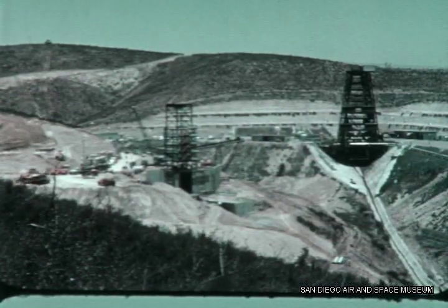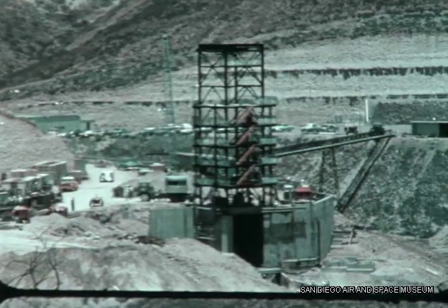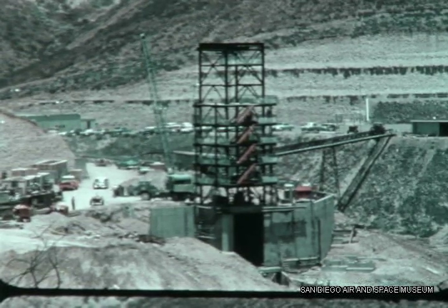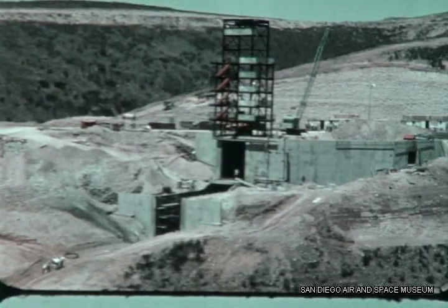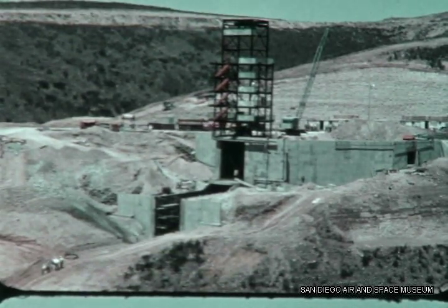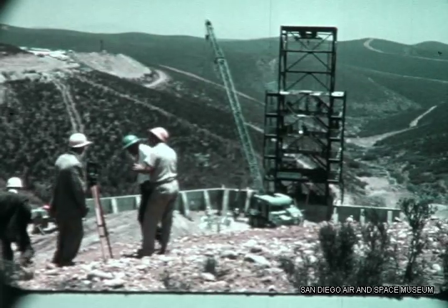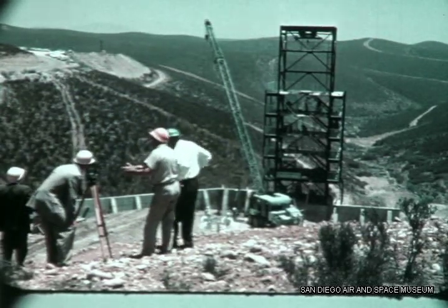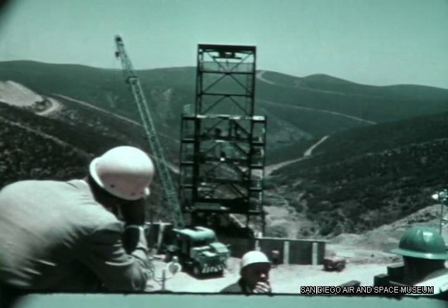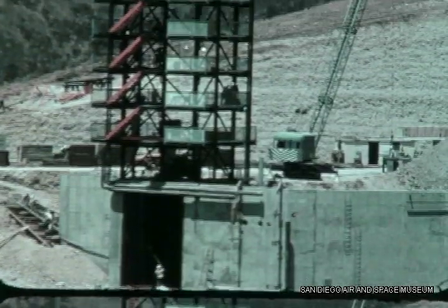In Sycamore Canyon, a few miles from the Convair Astronautics plant in San Diego, construction of the Centaur Static Test Stand, S-4, is nearing completion. This facility will support erection of the propulsion test vehicle in mid-October of this year. The service tower is 66 feet high and has retractable work platforms at 8-foot levels up to the 41-foot level. It is mounted over a 52-foot high water-cooled flame deflector.